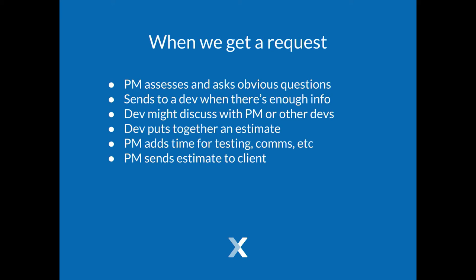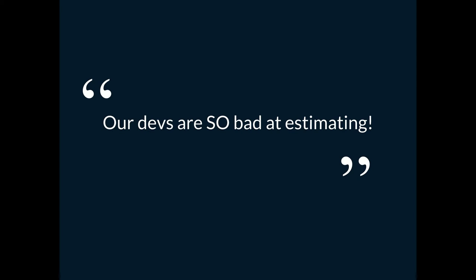But just one thing to note as well, probably can't say this is entirely true, but we try to make sure that all of our estimates are vetted by devs, so we don't have a situation where someone went off and said, oh yeah, I've heard of a module for that, that'll be fine, and then the dev team gets in and is like, what the hell, there's no way we can do this. So we try to avoid that at all costs.